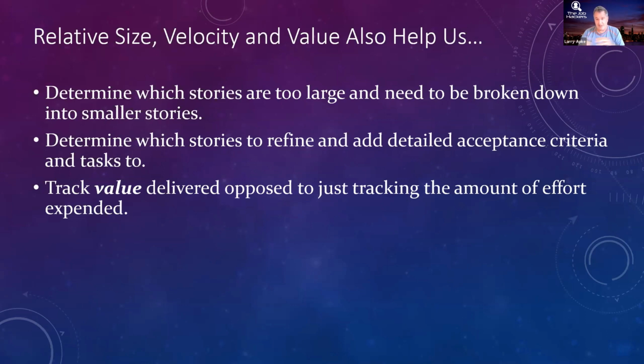And if you can't give them that feedback, what I've seen is they'll just take the most valuable stuff and throw it up at the top of the backlog. But that's not the best way to do it. Because if it's valuable and it takes a lot of time, I'm losing the opportunity cost of delivering all those other things that have maybe a little less value, but I can do really, really quickly. This is why I said most organizations don't pay attention to this.